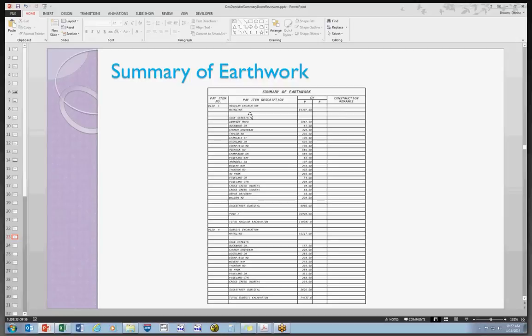So, I used to have a box for my earthwork at the end of the main line cross sections. And, you know, if I had a side street, all those side streets went together. For example, on Dempsey Mayo, at the end of that run, that last cross-section, there was a summary in there for that. Those are no longer to be put in the plans. The only summary of earthwork is in the summary of quantity sheet. It is to be located nowhere else.